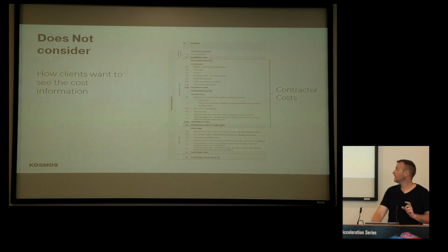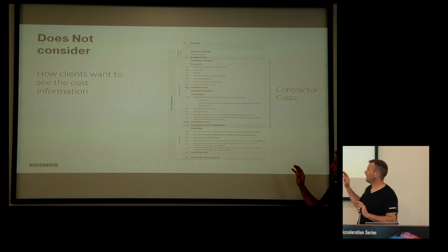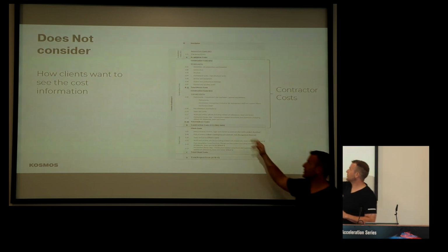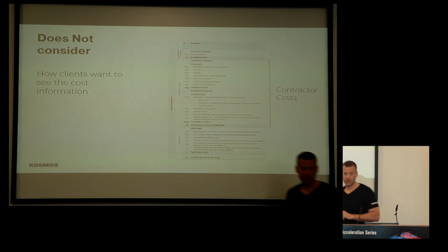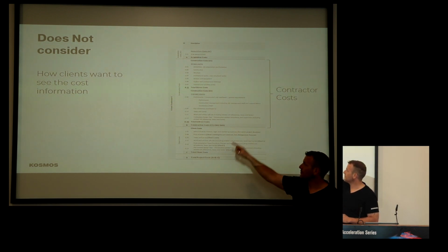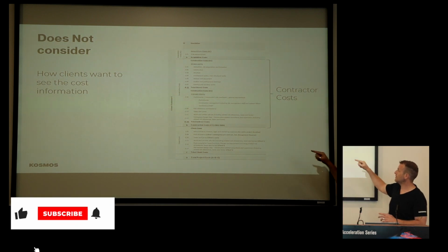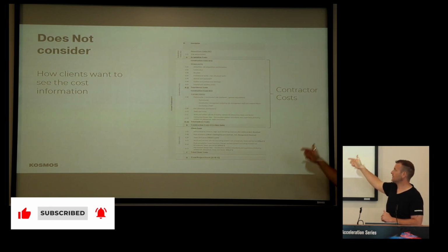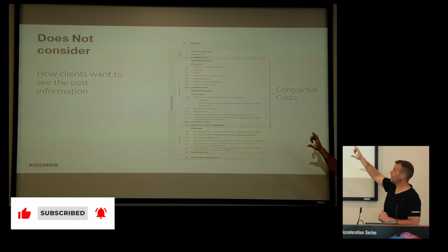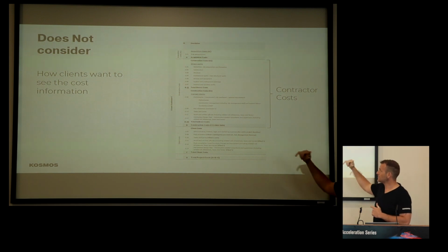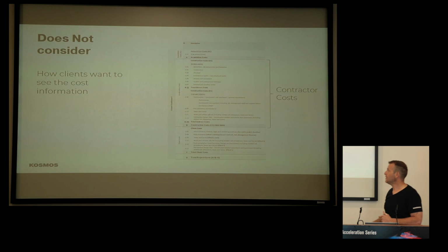But if you consider ICMS as a coding structure, and you consider data management, you can alter your standard in terms of how it's structured as long as you're following your coding structure and that stays true. So you can see in the indirect costs and client costs, they have some of the same numbering. Because as I mentioned before, ICMS does not define risk allowance for the contractor versus the client in that way. It defines risk. And so what we've done is we've split it, but the code is the same. So in our machine learning in the future, we'll be able to analyze these risks, taxes, consultancy fees, etc., because of the coding structure. And that's where it's key for us.